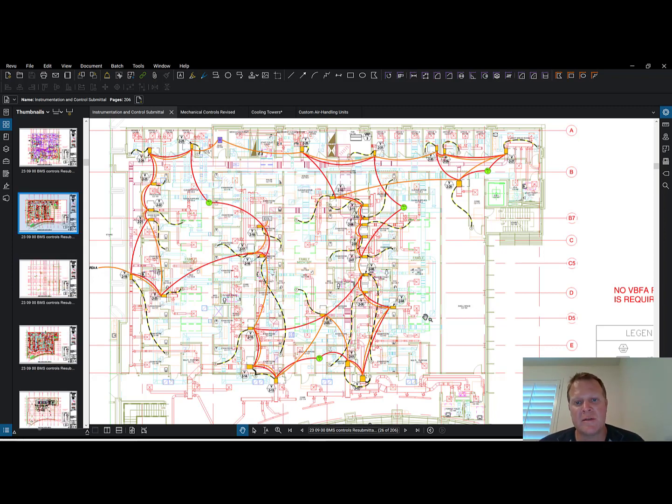The point is, if you know what the electrical panel is feeding, when the electrical panel is all terminated and wires are all done, and assuming the panels that are feeding it are all terminated and clear for power, we could turn those on. So knowing where the main parts are that are controlling everything matters.